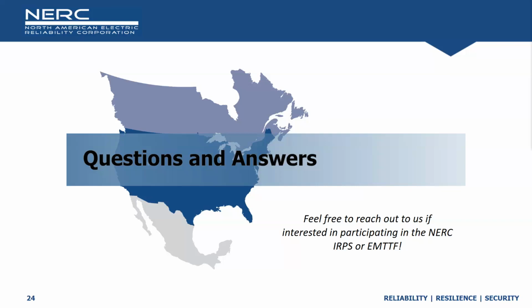It's challenges all across the board. It just really depends on the circumstance. My biggest concern right now is a bit of a disconnect between the interconnection models and the commissioning models. Sometimes the models are being tuned to meet the requirements in the immediate term to get through the interconnection process, and then, like Steve was mentioning earlier, those settings are not relayed back to him and his team, the OEM or any OEM for that matter.